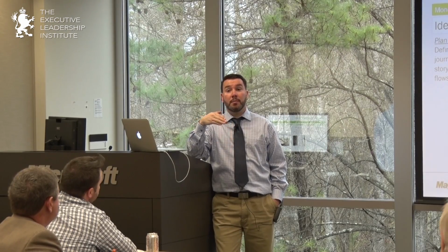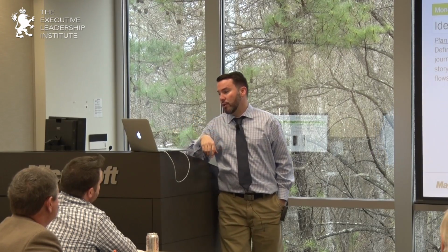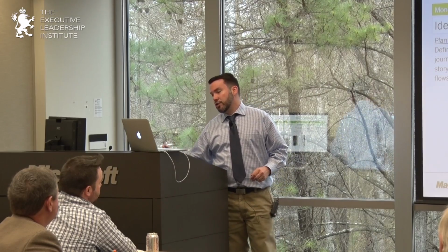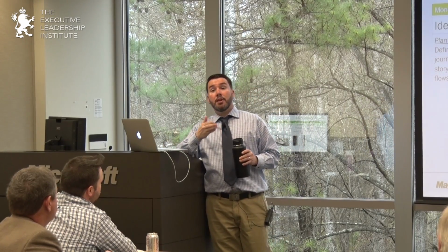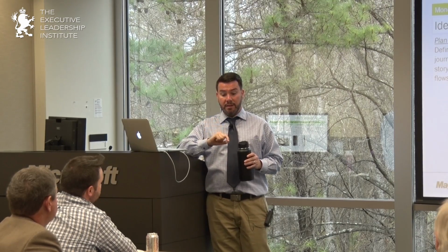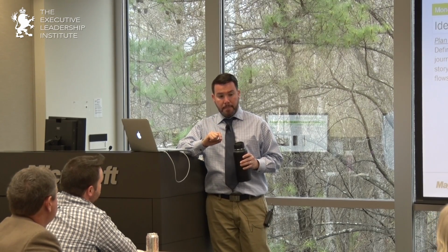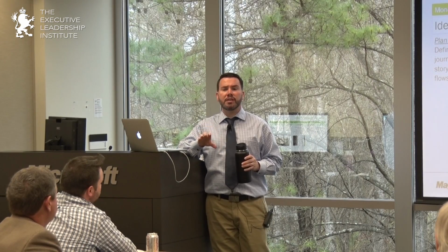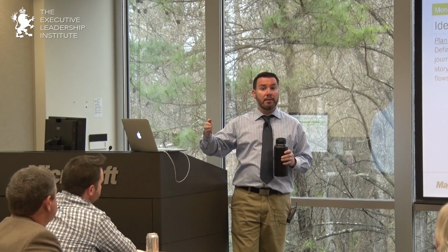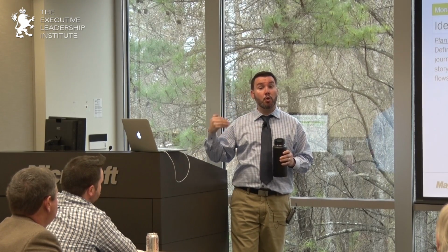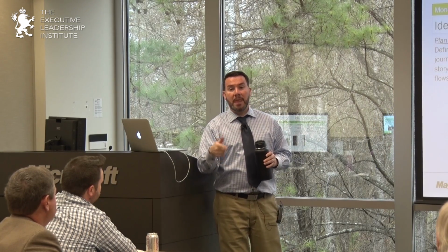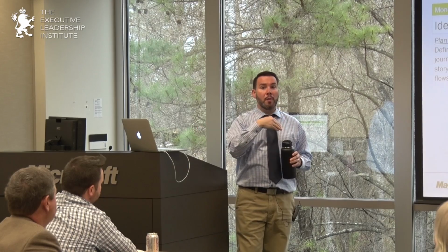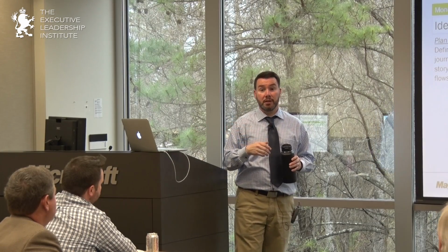The question was, are we time boxed by that process? And the answer is not always, because what we can do is say, I'm going to prototype a couple of sprints ahead, but you don't want to get too far ahead, because when they actually start seeing some of the code, technology is an input into that process, and things might change. And if I'm too far ahead, now I've got to go back and maybe reimagine something.